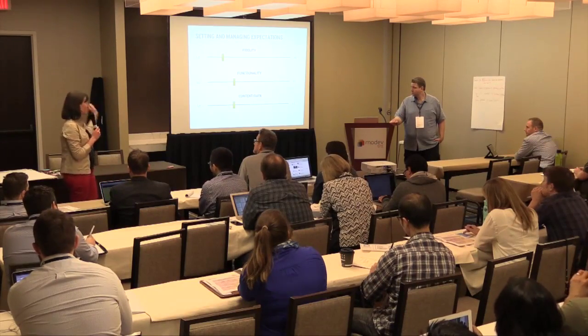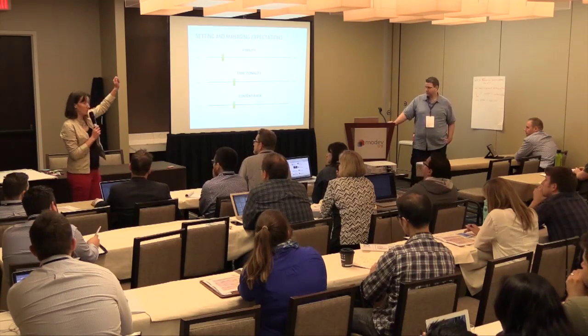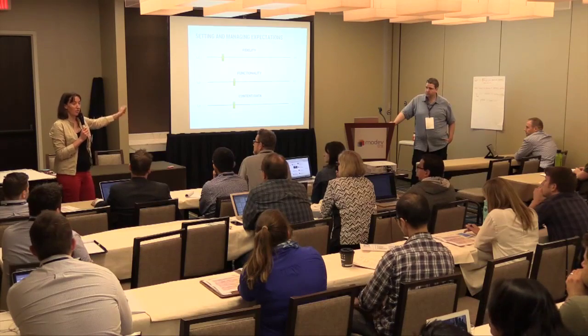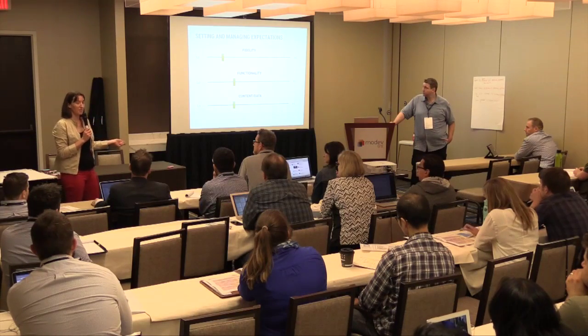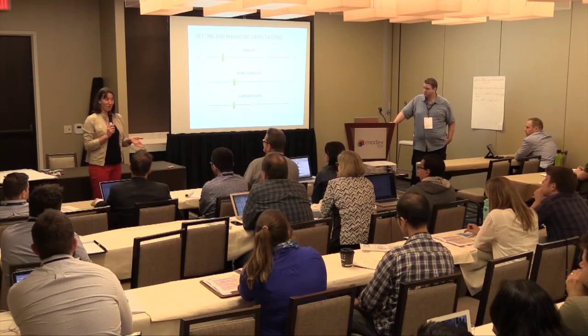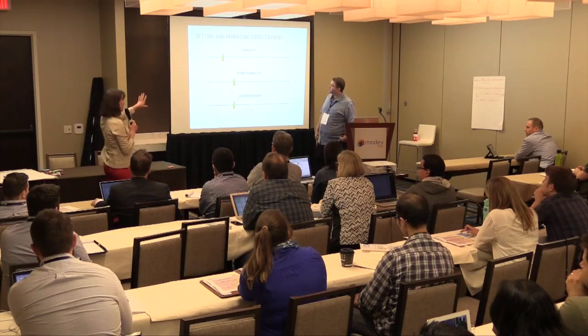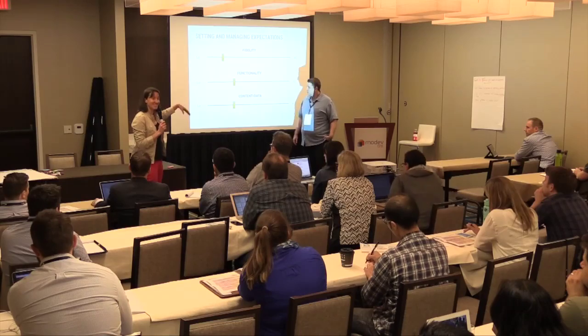So when I do this, I draw these 3 lines on the board. I talk to a client, I'm like, where do you think we should be on this prototype? And we draw it on the board. They usually start with something and it's like, that's great. So are we adding more people and time to this project, or are we sticking with our initial scope and timing? And then we might have to renegotiate a little bit.